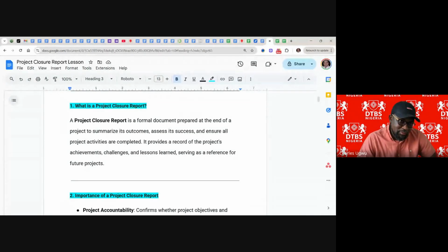It's the duty of a business analyst in this kind of project. So that's why I don't want us to deal with the acceptance form, because it's for business analysts. So once you get that green light, you put up your project closure report and get approval, have a review meeting with stakeholders, and the project is closed officially.